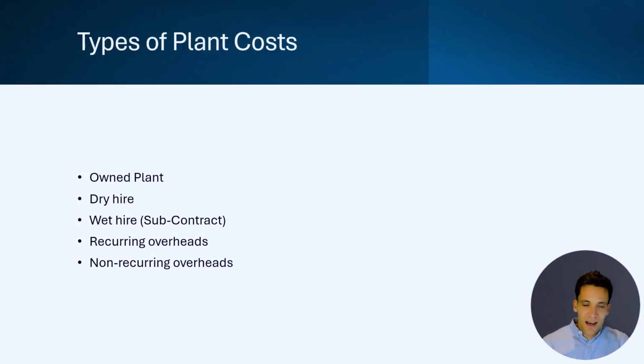We originally planned to be able to drill 10 a day. We went to having to use a sucker truck that cost $300 an hour, and we were doing 2 or 3 a shift. So you can imagine none of these costs were budgeted for. And I think this example is good because I'm going to walk through, when preparing the estimate, how when the estimators were looking at the job, they could have picked up this discrepancy. So hopefully the example reinforces it a little bit more. There's a ton of different plant costs on construction projects.